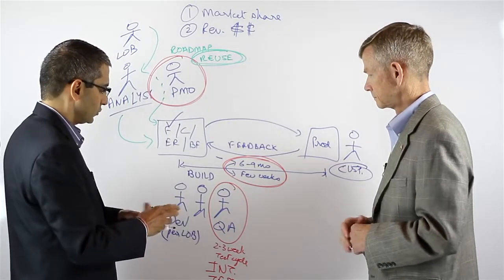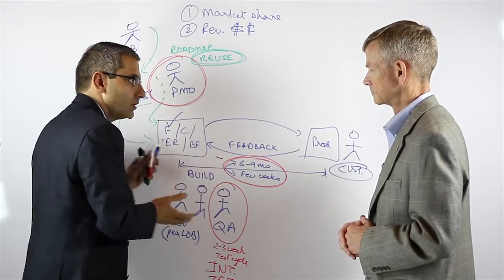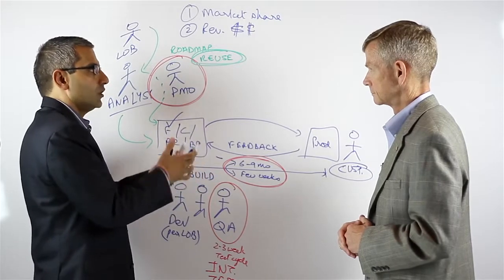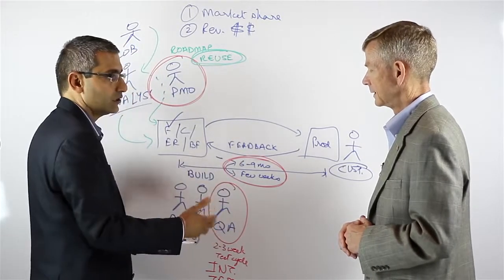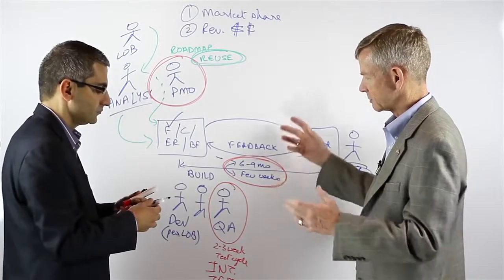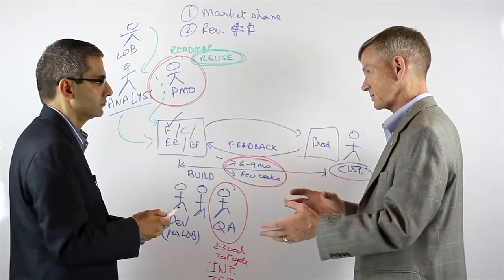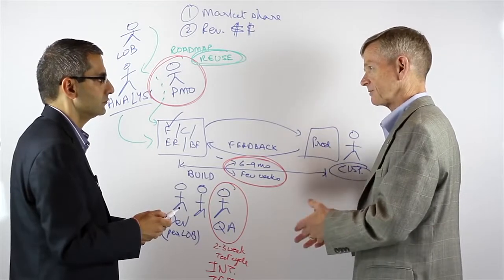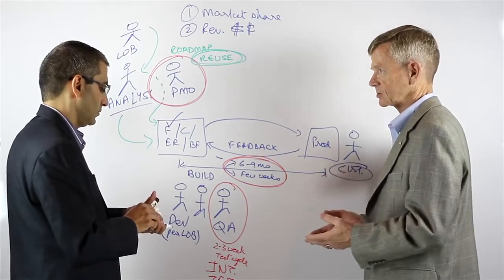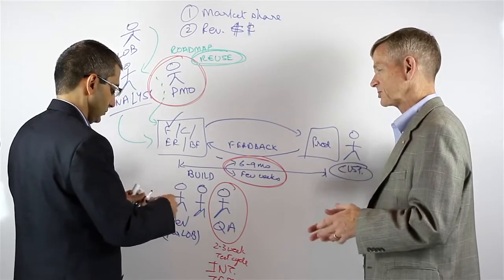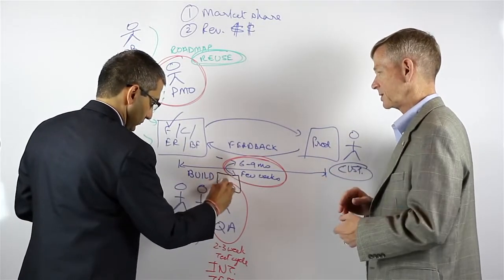And let's continue further. So from the QA environment, once that's done, obviously this is talking about one team. Are there multiple development teams? When that integration testing happens, is one of your issues that other teams' work is not available? But I'm trying to finalize, why is that test cycle 2 to 3 weeks? Exactly. So there's a couple things. One is because you've got multiple projects coming in from 6 business units, the issue of scheduling the QA test with the given resources, that is testers and the environment to test upon, that's a problem, so scheduling. And then the second piece is that the resources have to be provisioned and set up. I mean, we do have automated scripts for setting up those environments, and we're developing patterns of environments that we need to test upon, but it still takes time to get that set up.